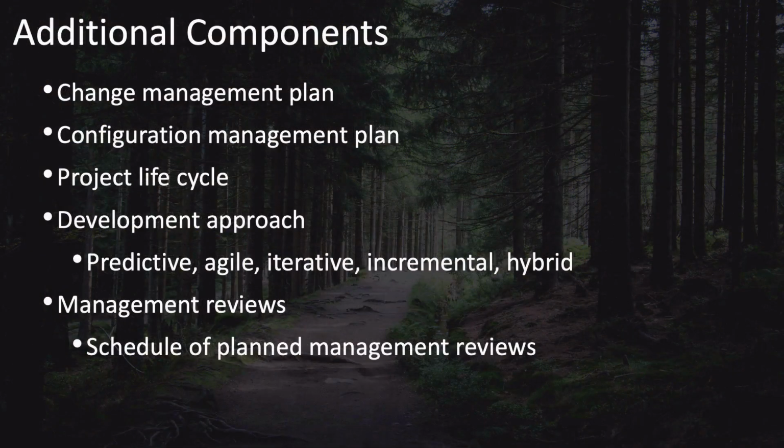Other components of the project management plan include the change management plan, which includes the rules for how changes will be reviewed and approved, the configuration management plan, which defines how changes will be made and managed, the project lifecycle, which defines the particular lifecycle that you've chosen for the project.